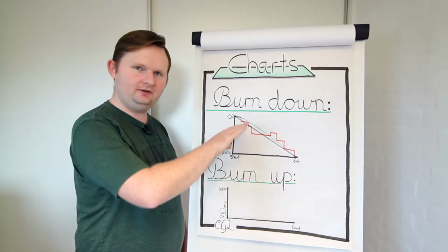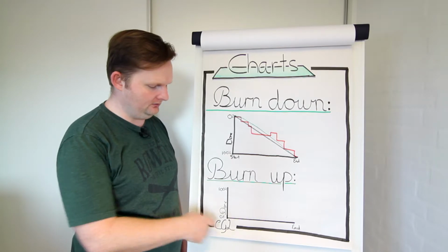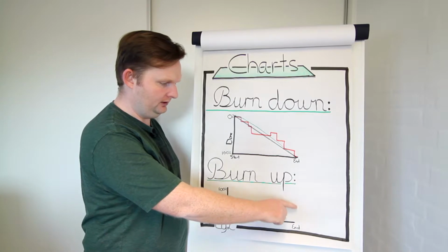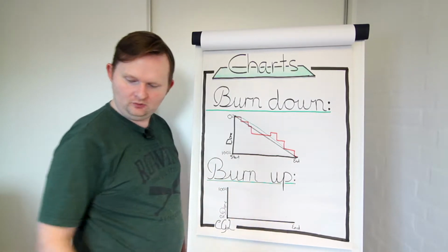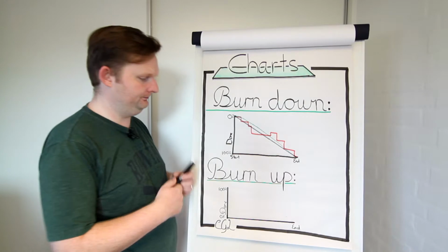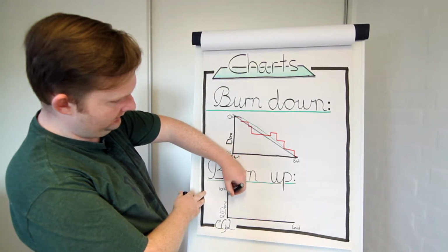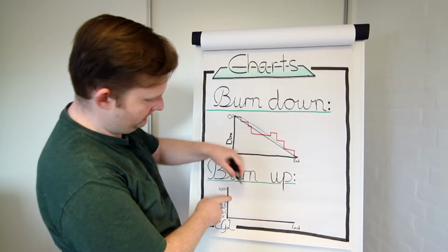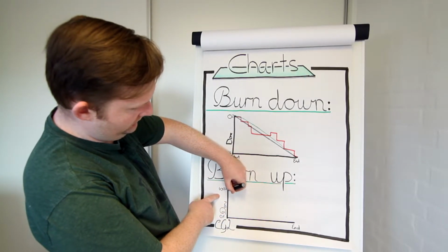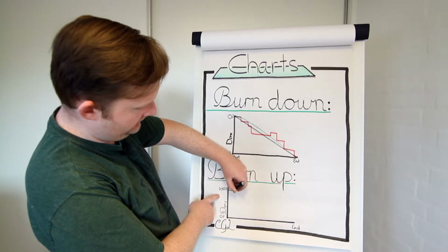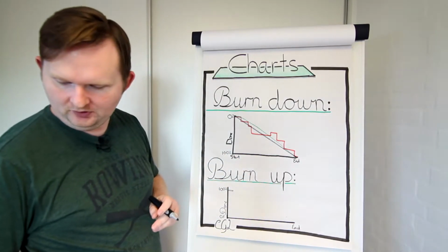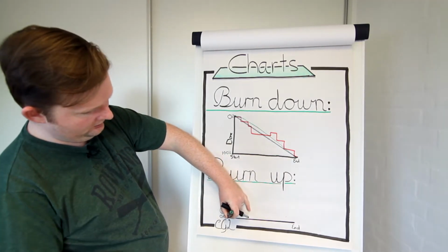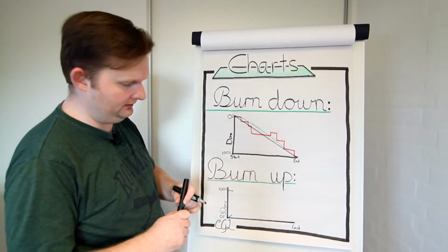The idea here is that we actually turn it upside down. So this is the start of the sprint, 0% done. This is the end of the sprint and 100% done. What we do is, when we start the sprint, we say that this is 8 issues or 100 story points, then we have a line here. So this is the scope of our sprint with the knowledge we have. And then we see that, okay, we finished something, so now we're here.